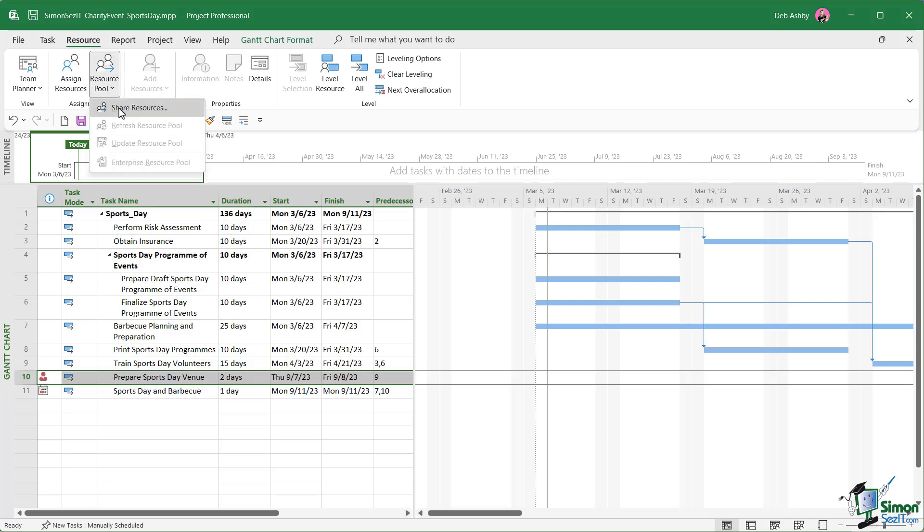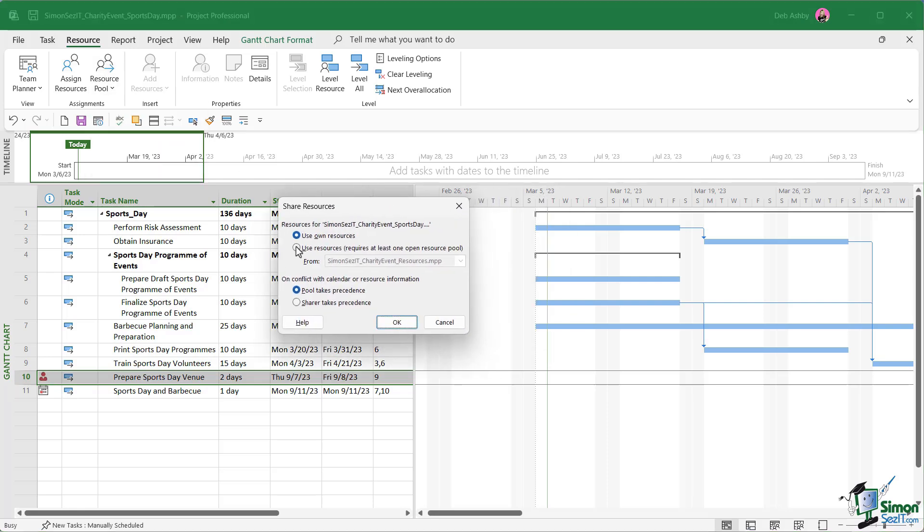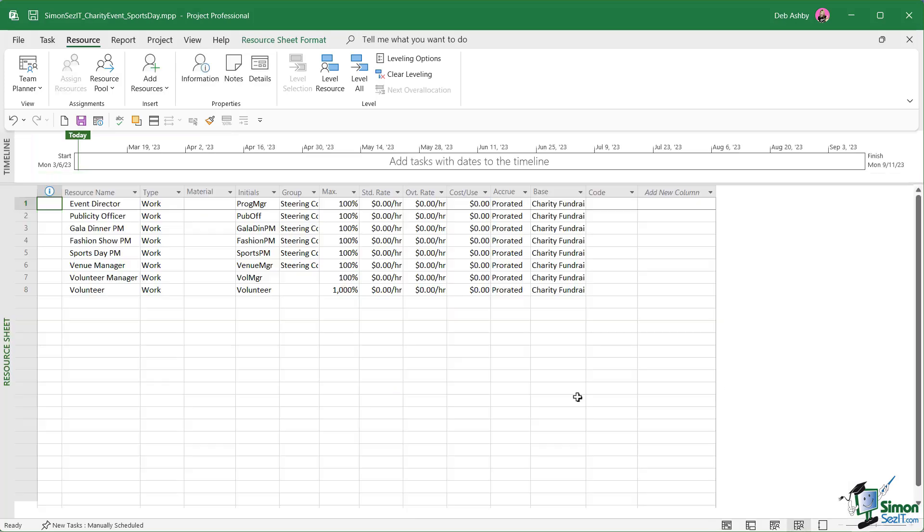Now if we go back to resource pool and share resources, I'm going to make sure we're using resources from our charity event resources file. We're going to say the pool takes precedence. When I click OK, watch what happens to task 10. You can see that that over allocation is resolved. That's because if we now go to our resource sheet, this project is using the resource pool and not just the two resources that were included when we copied the tasks across. What we now have is a resource pool and a project that is using that resource pool.